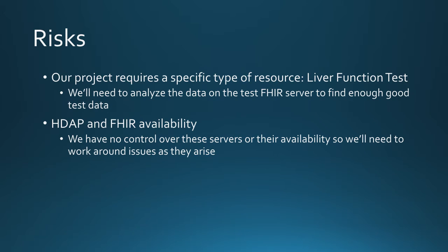Other risks that have come to light are that our project requires a very specific type of resource, that being a liver function test. We'll need to analyze the data on the test Fire server to make sure we can find enough good test data. Also, we've encountered some issues with HAPI and Fire server availability. Since we have no control over those systems, we'll need to work around those issues as they arise.